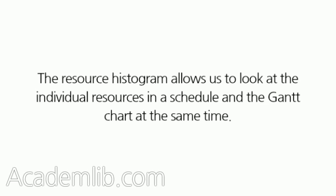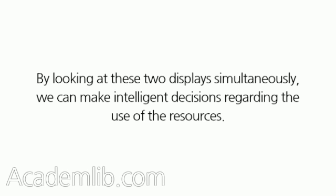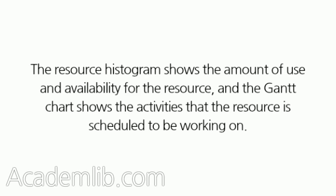The Resource Histogram allows us to look at the individual resources in a schedule and the Gantt chart at the same time. By looking at these two displays simultaneously, we can make intelligent decisions regarding the use of the resources. The Resource Histogram shows the amount of use and availability for the resource, and the Gantt chart shows the activities that the resource is scheduled to be working on.